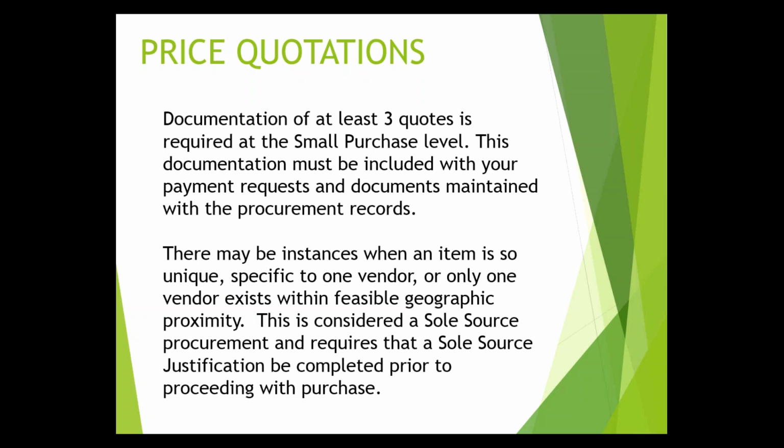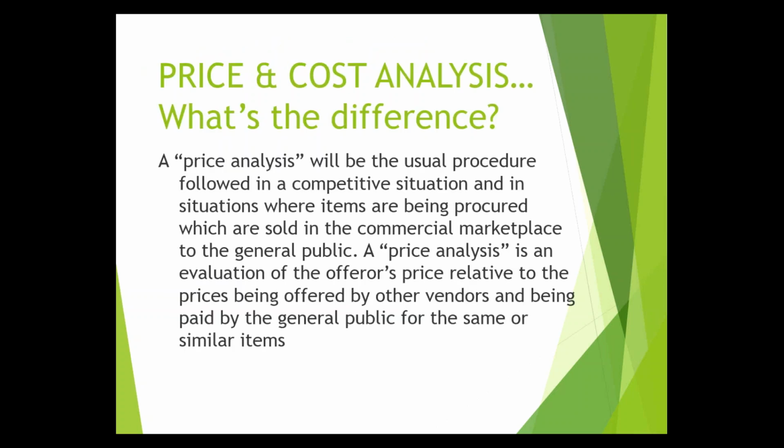There are instances, though, if you have, say, a scheduling and dispatch software that you want to add a component to, it wouldn't make sense for you to change the entire software system, your entire scheduling dispatching software. You just need to add a module. So that is one example of a sole source. We've run into that with radios when you're adding additional things to radios, and there are any number of things that come up, but we want to avoid sole source as much as possible, except in the instances that I just gave examples for where it's a must.